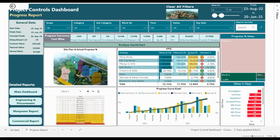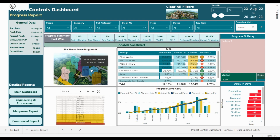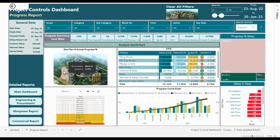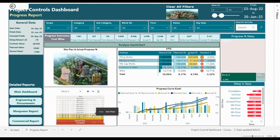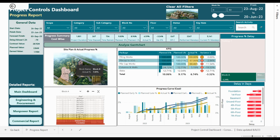Let's move to the detailed progress report. On the left side is general data and the site plan of the project showing the actual percentage of each block based on the data date from the updated Primavera. If you select any of the buildings, the whole dashboard will interact with that building and will show you which areas you are behind schedule, ahead of schedule, or in line with the schedule.